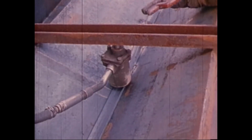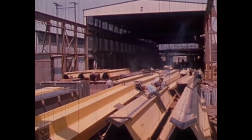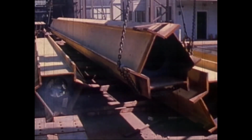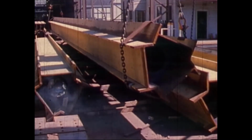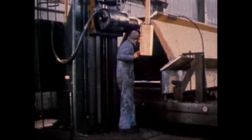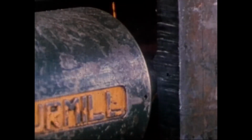They're working 3 shifts in the shop now, and the yard is full of main leg sections ready to go. The tubes are stiffened with diaphragms on the inside at a maximum spacing of 10 feet. Here's how they turn the sections so welders always have a down hand to weld. Like the core sections, legs go to the mill, and the ends are finished precisely before they're sent out to the erection crew in the field.